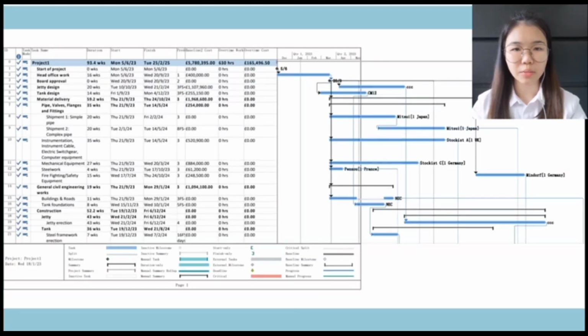At this stage, the project was already done, but an early schedule delivery caused by the vendor rated 3 for installation and finishing activity has reduced the total duration of the project. Complex pipe installation also was delivered 2 weeks early. Therefore, these 2 early deliveries have pushed the total time to 93.4 weeks and the final cost to £5.78 million.